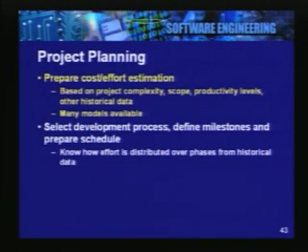We said earlier that there can be many different types of processes. So you choose the one which is best suited for the task at hand. You define the milestones and you prepare a schedule. In order to prepare this schedule, we of course need to know how the effort is distributed over the different steps.